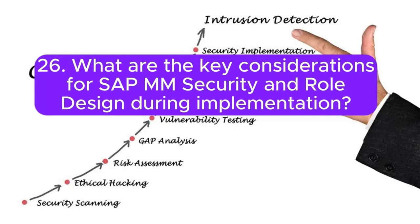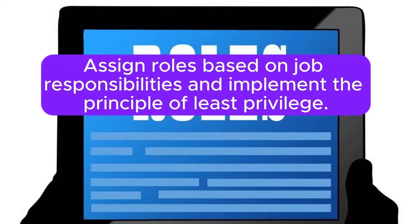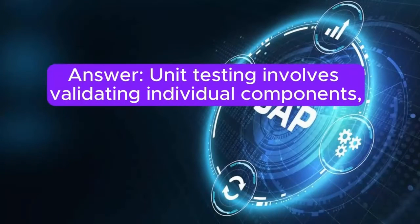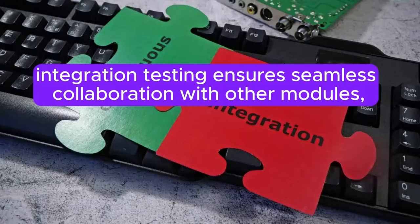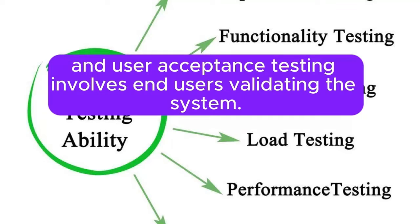Question 26: What are the key considerations for SAP MM security and role design during implementation? Answer: Design roles and authorizations using transaction codes like PFCG to ensure data security. Assign roles based on job responsibilities and implement the principle of least privilege. Question 27: How do you handle SAP MM testing — unit testing, integration testing, and user acceptance testing — in an implementation project? Answer: Unit testing involves validating individual components. Integration testing ensures seamless collaboration with other modules. User acceptance testing involves end users validating the system. Rigorous testing is critical for a successful implementation.